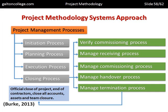Manage the termination process — officially close the project, end contracts with contractors, close all accounts, and manage assets and team closures. Make sure that the teams are reassigned, contractors have been contacted to ensure no more supplies are coming through the pipeline, and all accounts are closed so the accounting function within the business understands that the project has now come to an end.